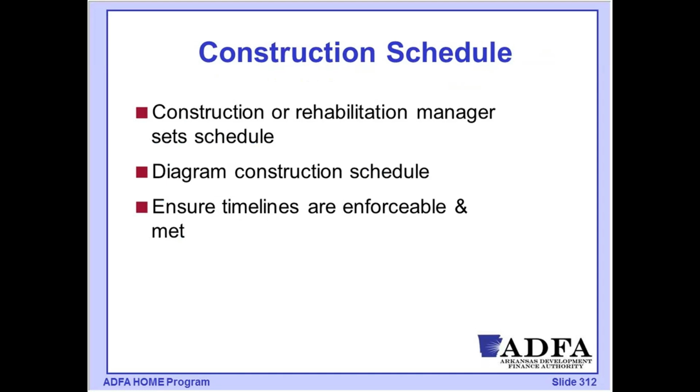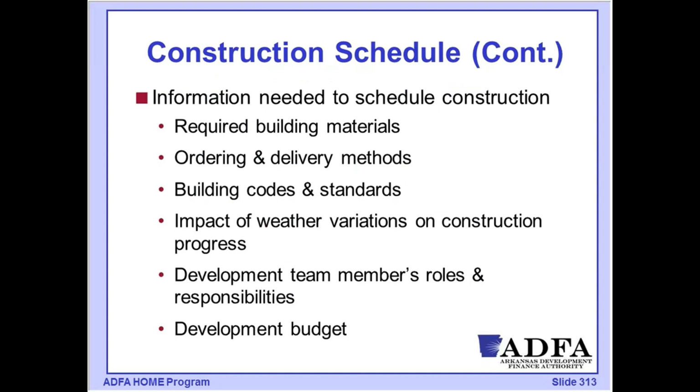We don't have workers kind of tripping over each other trying to work in the same space, but it's also how we're going to then try to enforce our expectations on the timeliness of moving that project forward. So that has an impact on things like, when do we need building materials to be on site? So to get them and have them available, when do they need to be ordered? Where are they going to be delivered to? Where they're going to be stored?